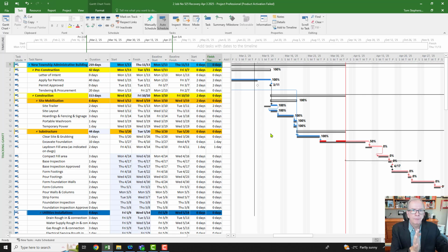This is what happened, right? This is where we are. And we're trying to figure out, how do we get that time back? And now the recovery is the expertise of the site super, the project manager, the team working together with the trades to figure out what's the best way to get that time back. And so that is what the recovery is. And knowing what's going on in your project, and of course short-term look-aheads really help with this aspect of it.